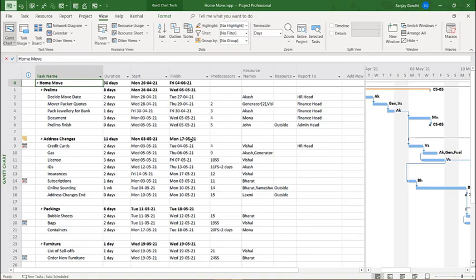Plus we can add some formula fields also when required. These can really help us in adding up some formula. For example, days left across my finish date and days passed over my start date. Finish date is more important. In case my project is in progress, we'll always like to see how many days are left for a particular task. So we can keep that entry available in the form of a computation formula for that matter.